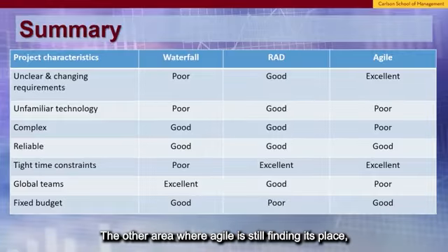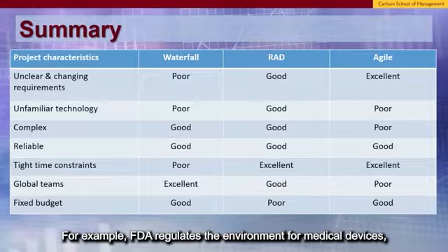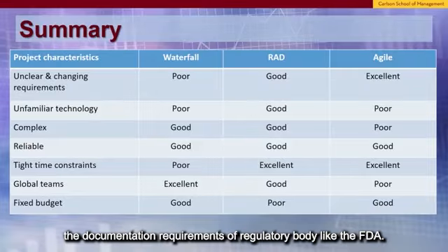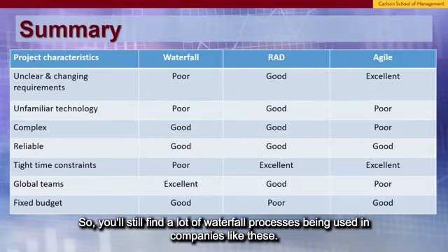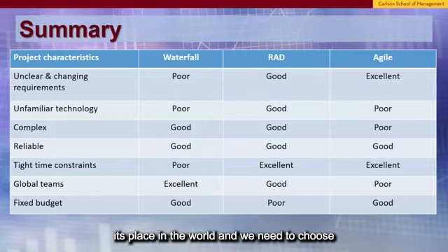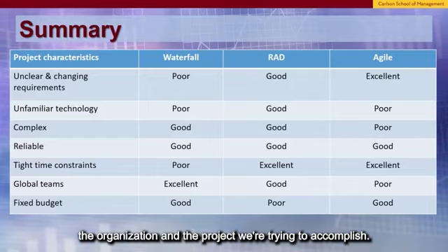The other area where Agile is still kind of finding its place, so to speak, is in highly regulated environments. For example, FDA regulates the environment for medical devices, and Agile processes don't often meet the documentation requirements of a regulatory body like the FDA. And so you'll still find a lot of waterfall processes being used in companies like this. In summary, though, I want you to understand as a learner that each methodology kind of has its place in the world, and we need to choose the appropriate methodology based on the organization and the project we're trying to accomplish.